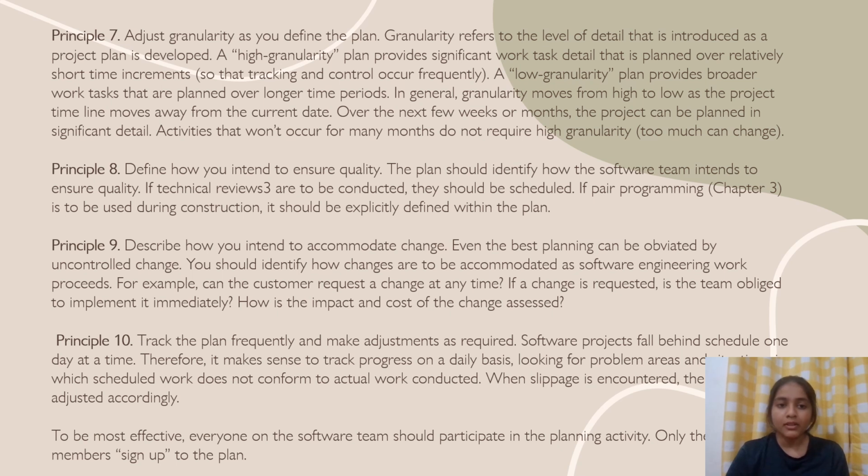Principle 8: define how you intend to ensure quality. The plan should identify how the software team intends to ensure quality. If technical reviews are to be conducted, they should be scheduled. If pair programming is to be used during construction, it should be explicitly defined within the plan.